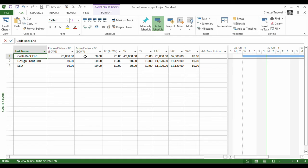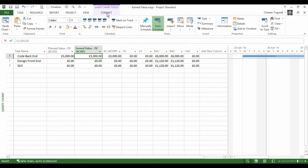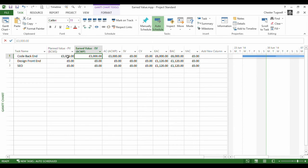Now let's go in and say, well, we have actually done 50% of the work. So that's correct. Up to our status date, according to the baseline, we should have done 50% of the work. So the earned value is £3,000, but the actual cost is £3,000 as well. That's all the same as the PV value, the planned value as well. So these are all in sync at the moment.